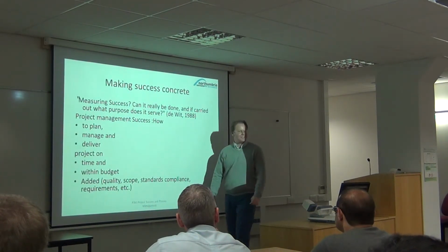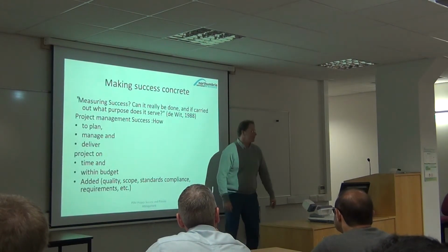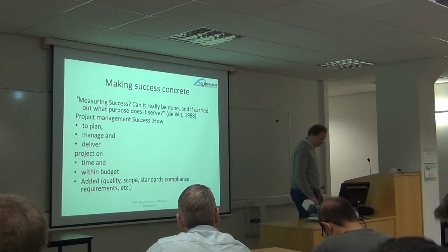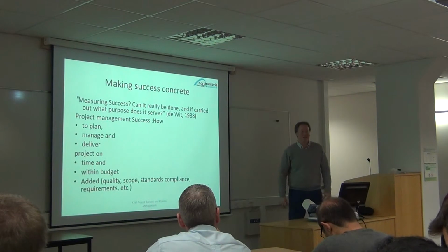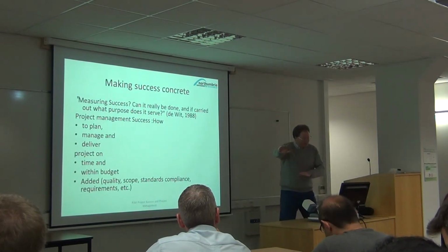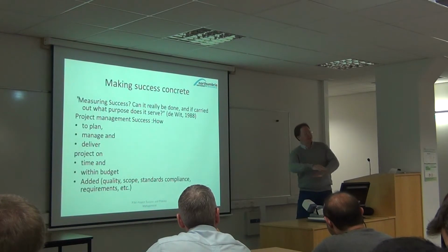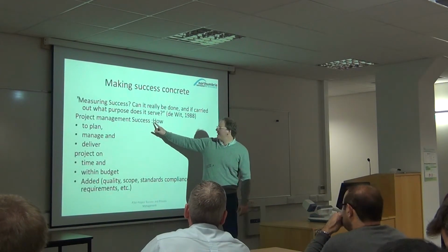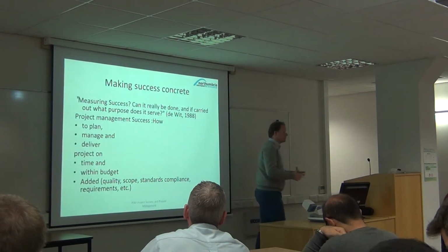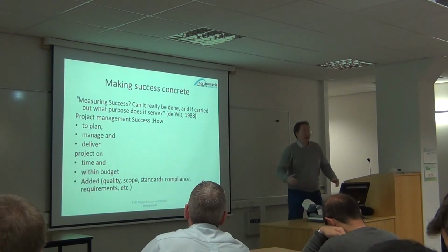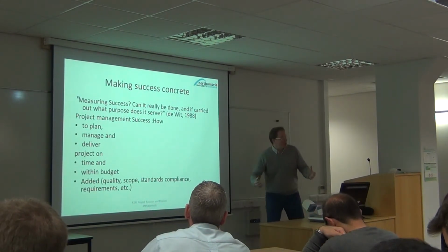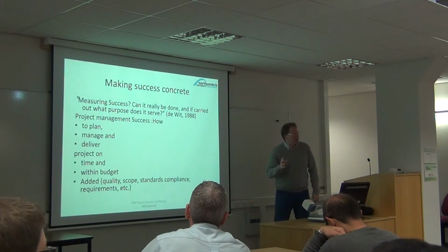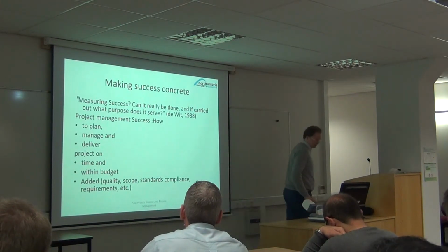Now, here we are already iterating and starting negotiation. They hadn't considered the stakeholders. I can tell you there are a lot of wonderful solar panels at the moment in regions in Afghanistan that are just full of dust. They are little containers and blend into the landscape now. It looks like an extension of the roof, but it's not functioning. So be careful, the how is very important. The real thing would have been to figure out why they hadn't got solar panels already, and think about how their habitus and life dictates methods that are applicable. Just to give you an example.